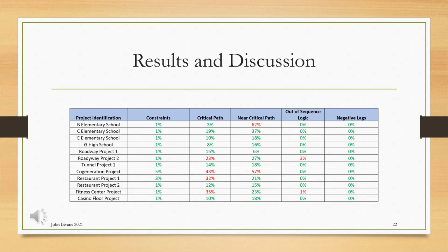In reference to project duration, of the 4 projects that failed to meet the critical path percentage, 3 projects had a duration beyond 330 calendar days. This is a good indication that this metric has a greater impact as the duration of the project increases.